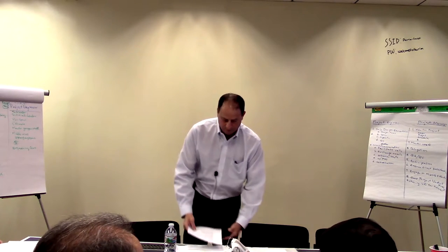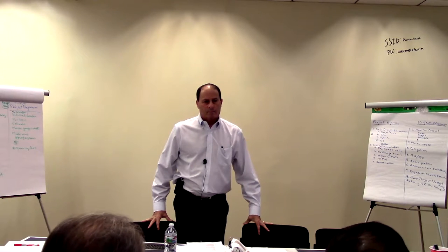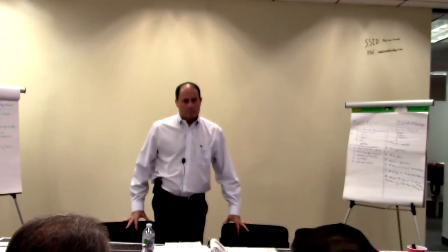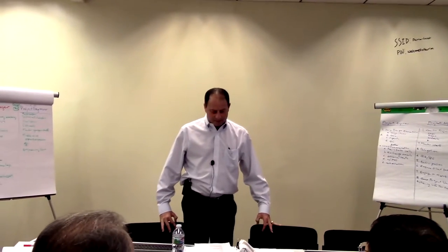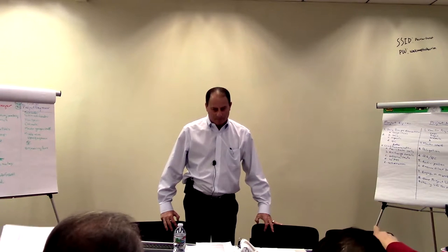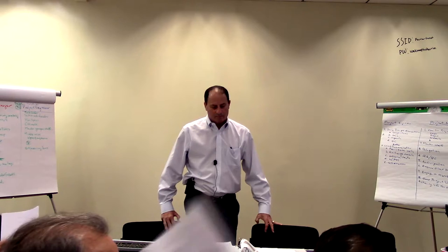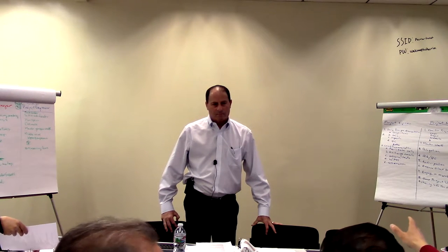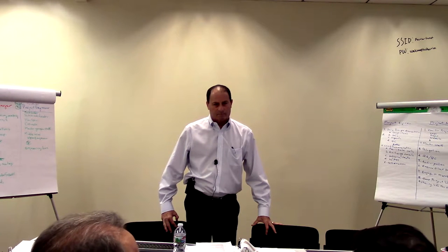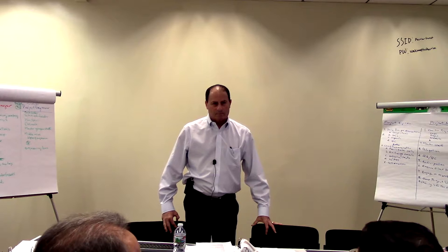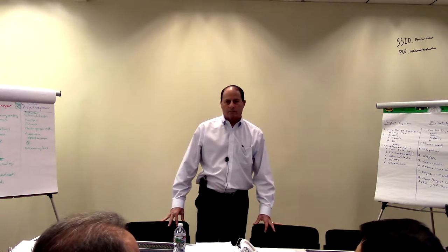The one thing that did not show up here is the engineering decision making level. For project engineers, you're supposed to make all the engineering decisions within the domain, within the task you are working on, and move the project forward. A project engineer should not make an engineering decision that relates to other disciplines or other parts of the project without the project manager knowing that, and vice versa. The project manager should make a decision in context of the overall project, and inform the project engineer. So there's a really fine distinction between how much engineering decision making, let's use the level of authority, through the project. The more you understand that distinction, the better that can be.